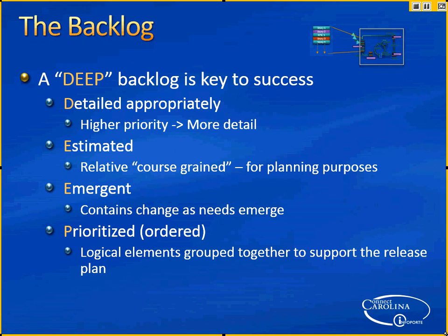Estimated: initially, it could be fairly coarse-grained for planning purposes, but before it gets into an actual sprint cycle, it's going to have to be down to the story point level that we're comfortable fits in whatever the sprint length is.